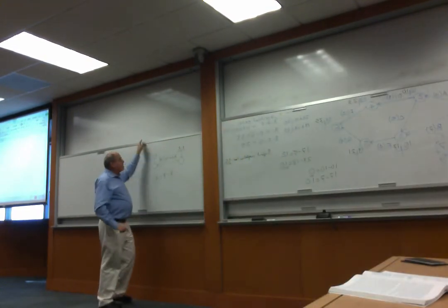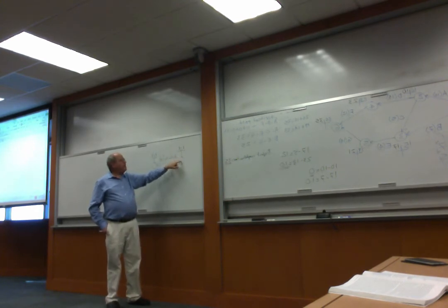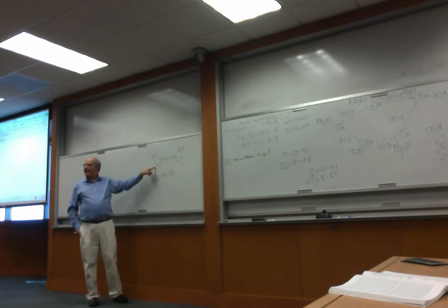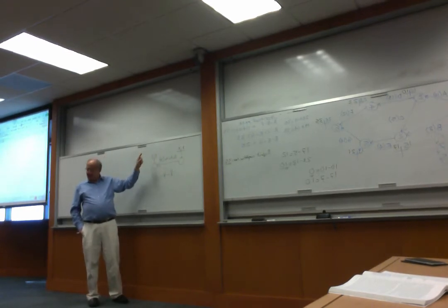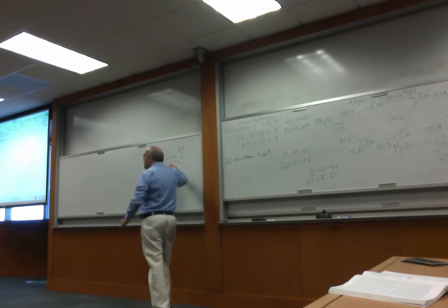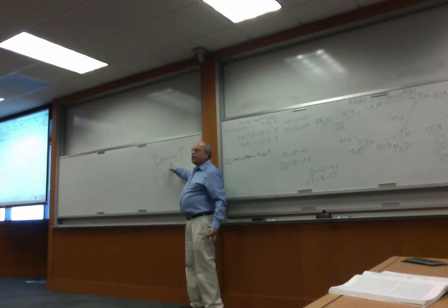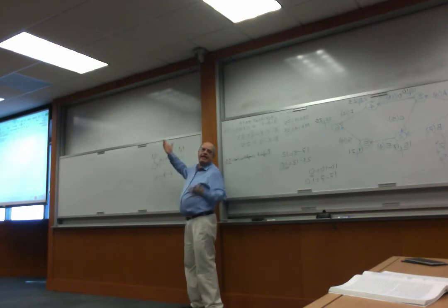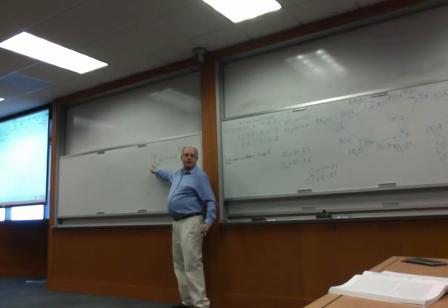What is the first condition? Where the activity starts, there must be two equal numbers. Second condition, where the activity ends. Wait, you said again? Yeah, let me repeat. An activity is part of the critical path if the following conditions are met. First condition, on the starting point, the two numbers are equal. K and K are just any number, but it's the same number. The second condition, where the activity ends, the two numbers are equal.